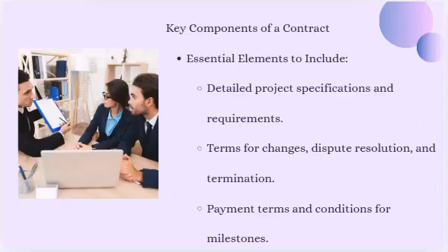Key components of a contract. When drafting contracts, it's essential to include several key components. Detailed project specifications and requirements should be outlined clearly. It's also important to specify the terms for changes, dispute resolution, and termination. Lastly, include payment terms and conditions related to project milestones to ensure transparency.